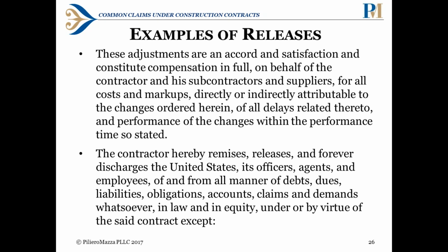And then under the second one, we have the contractor hereby remises, releases, and forever discharges the United States, its officers, agents, and employees of and from all manner of debts, dues, liabilities, obligations, accounts, claims, and demands whatsoever in law and in equity under or by virtue of the said contract, except, and note that there's that ability there, as we're talking about, to write in any claims that you have. So make sure that you take advantage of that and put the government on notice there, reserve your right by writing in your claims. Otherwise, you can see that this language is incredibly broad and really is intended to release everything.